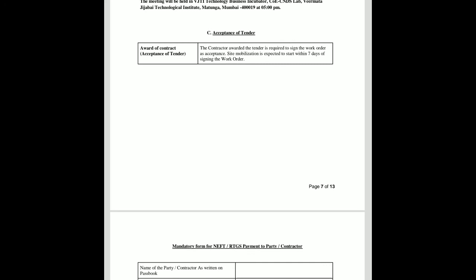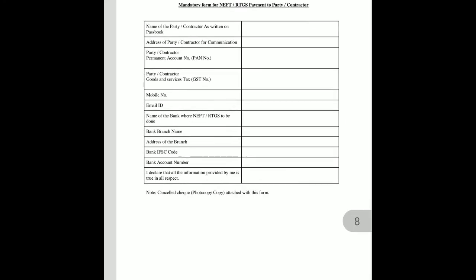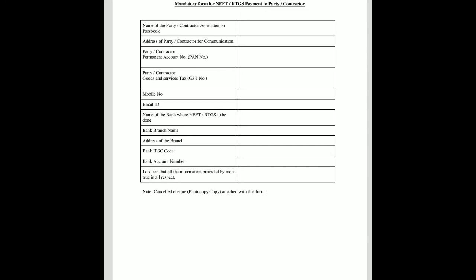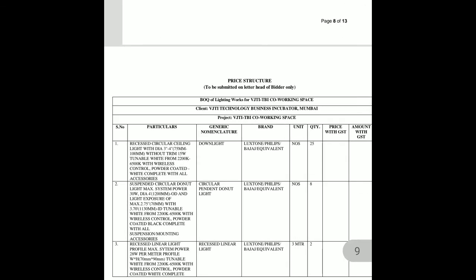For acceptance of the tender or award of the contract: the contractor is required to sign the work order, and site mobilization must start within 7 days of signing. A mandatory form must be filled for NEFT/RTGS payment to the parties. This form includes the name of parties, address, payment details, contractor PAN number, contractor GST number, mobile number, and email address.